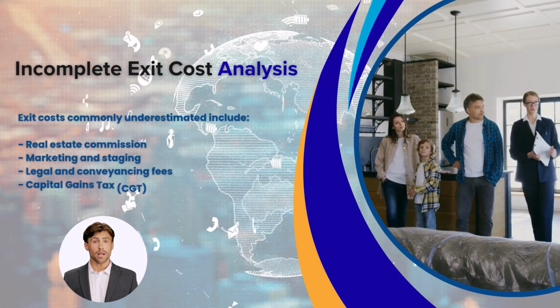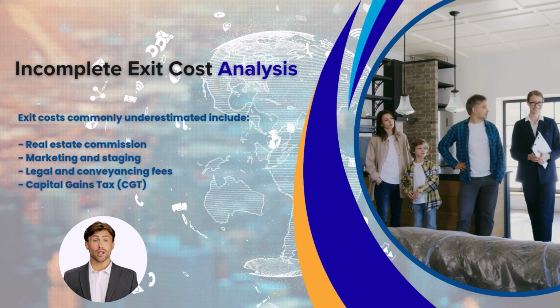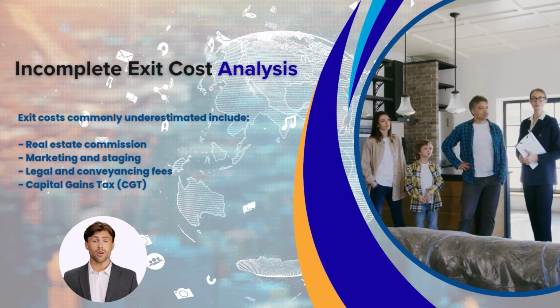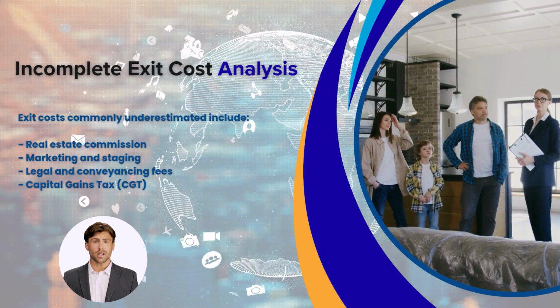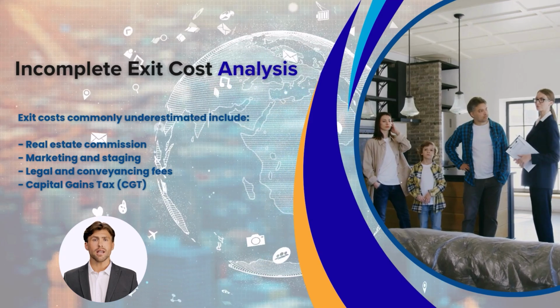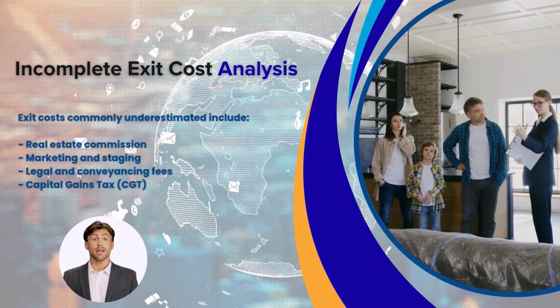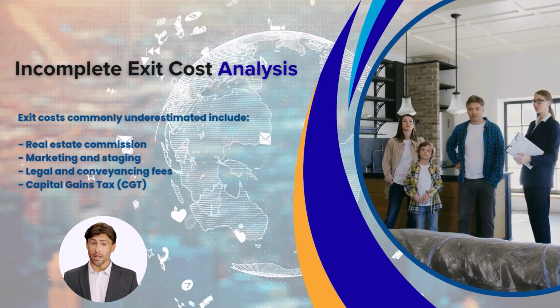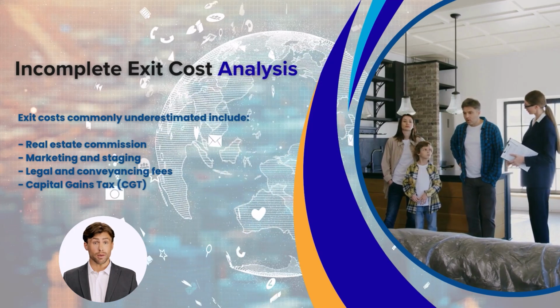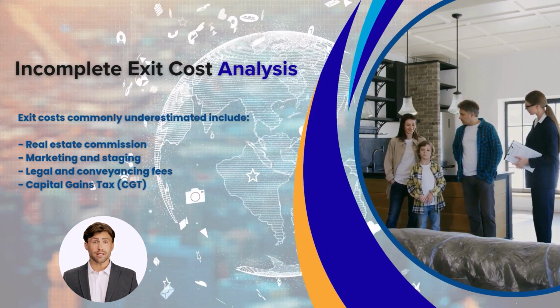Incomplete exit cost analysis. Exit costs commonly underestimated include real estate commission, 2 to 3% in metro areas, marketing and staging, photography, styling, online ads, legal and conveyancing fees, capital gains tax, CGT, especially if held in a trust or company structure, or the property isn't covered under the main residence exemption.